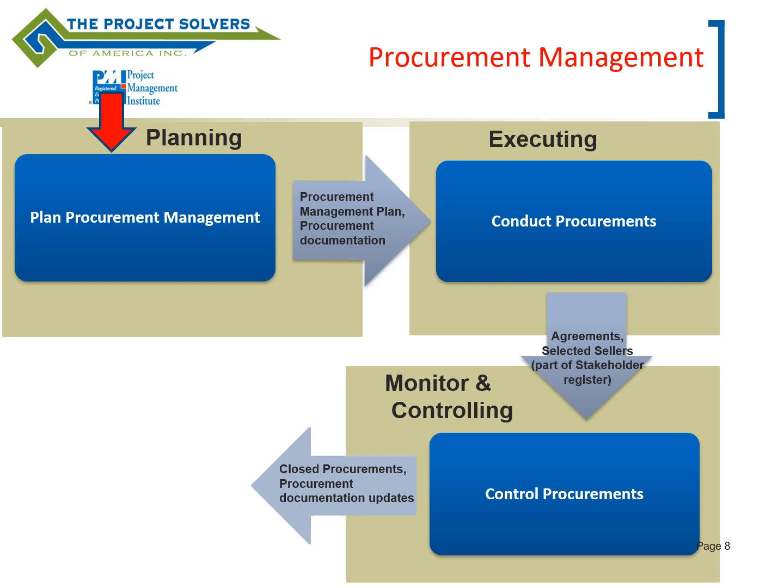Then conduct procurements. You're looking for a vendor. You award it with a contract, and PMI calls that an agreement. So you see agreement as an output, as well as the selected sellers. And notice that that is plural, because you could either have decided to pick multiple suppliers, or you could have narrowed down a list of suppliers to a short list, and then have an evaluation committee ultimately be the one to decide who the final supplier is going to be.